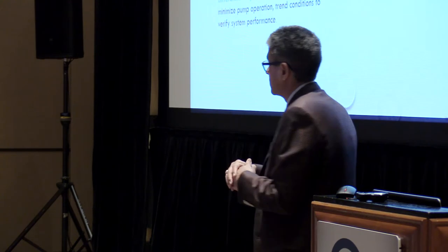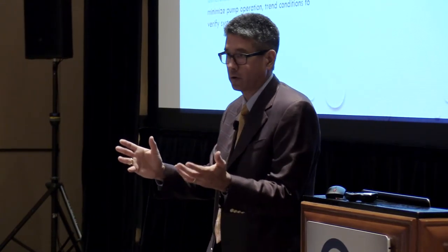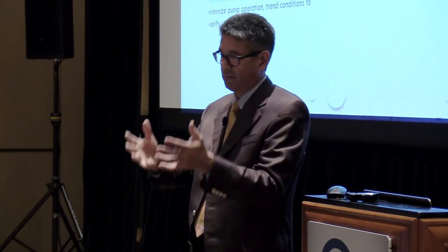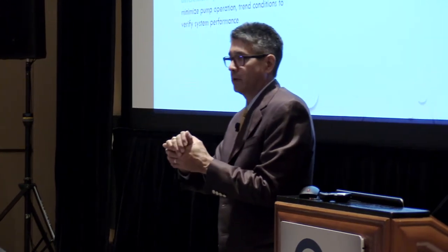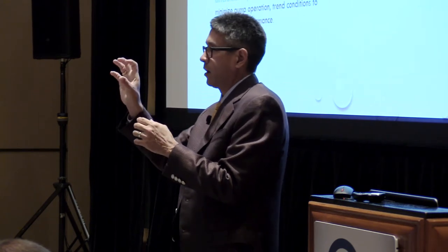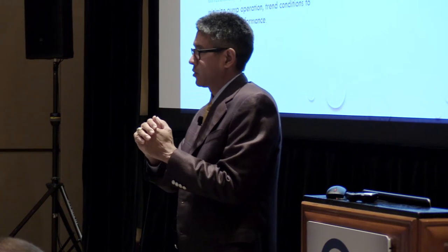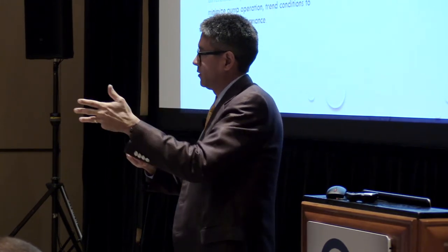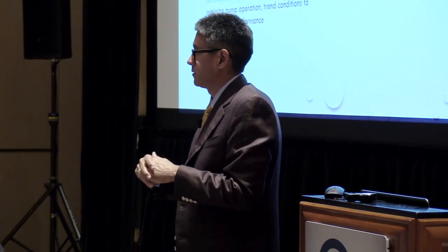One thing that we always laugh is, anytime something's written down in a test and balance report or a commissioning report, that's gospel, right? Can't be changed, it's perfect. So we get that and we set that DP set point. And we'll tell all our owners or the facilities guy, all right, we're starting off at 12 PSI. This winter, drop it down to 1 and trend your VFD speed, your DP set point, make sure it's maintained, your space temperatures, and then see if you get complaints.